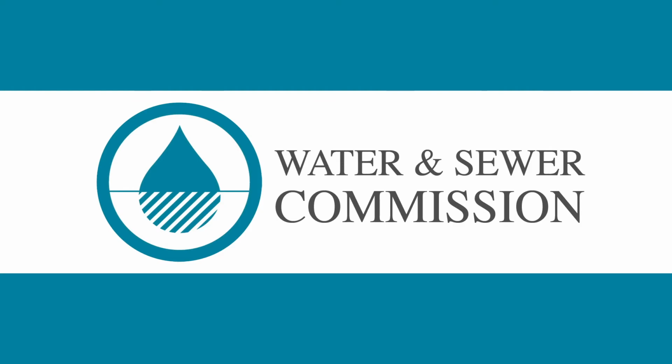Yeah, I can give you a quick update. Unfortunately, not a ton has happened since 2 weeks ago. They have continued to button up the pavement both on Wheaton and through the intersection of 123 and 144, including the painting of the lines. So the areas that are already completed are in good shape. They are continuing to do work at the pump station, the utility extensions. They finally got the gas company and National Grid out there and did their work. So they were able to extend both the gas for the generator and the general power for the station all the way from the street to the station.